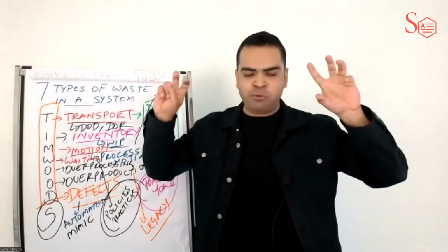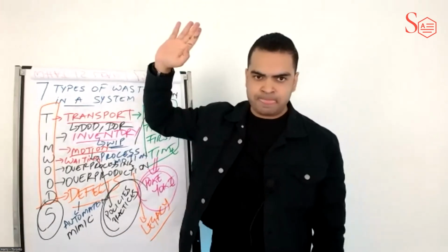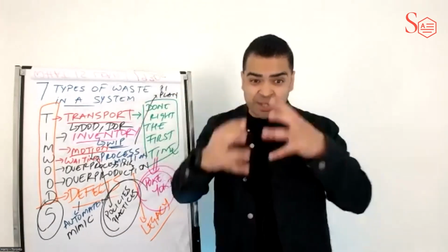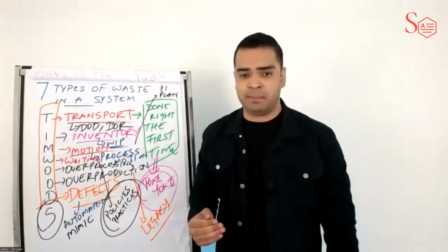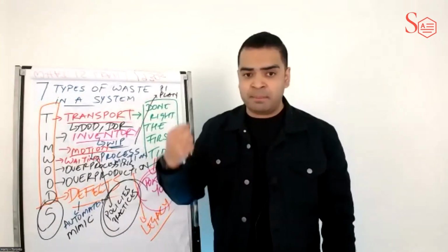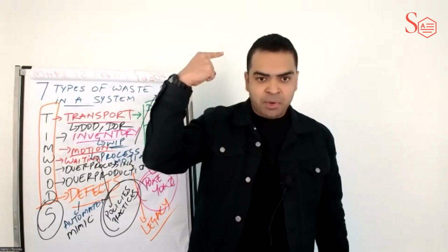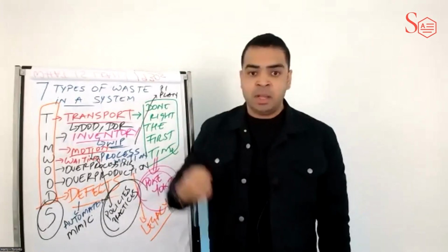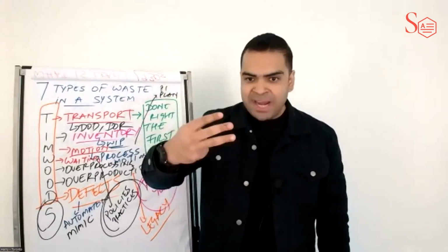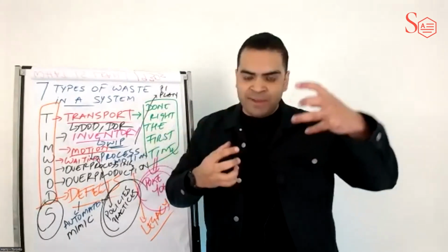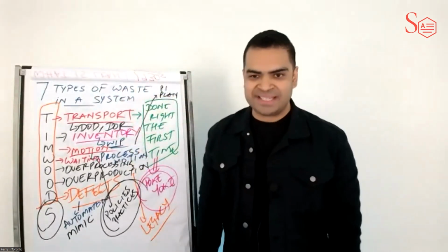Keep an improvement backlog. Any Scrum Masters keeping an improvement backlog for your team? Improvement backlog. That is a backlog that a Scrum Master should have, which creates a list of improvement items that you want to implement. For example, an improvement backlog item in your improvement backlog today could be, I want to help my team create a definition of done for a sprint. Then I want to help my team create definition of ready for a story. I want to help my team start evolving their infrastructure so that we can get closer to that microservice design.